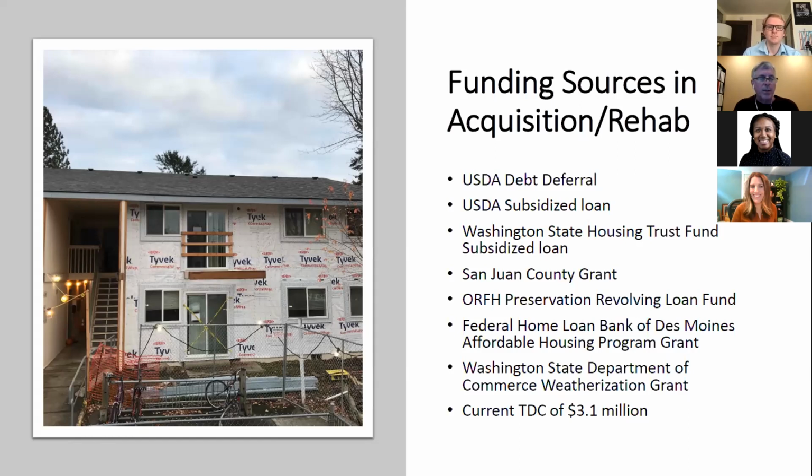I'll say that in the process of working with the seller, one of the biggest hurdles that we had was that the seller was not willing to enter into a purchase and sale agreement until we had proven to their satisfaction that we had the resources to both pay for the acquisition and for the rehab that USDA would require pretty quickly after acquisition.